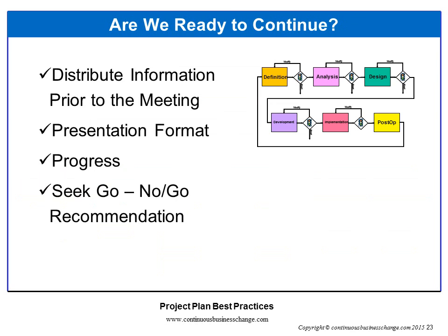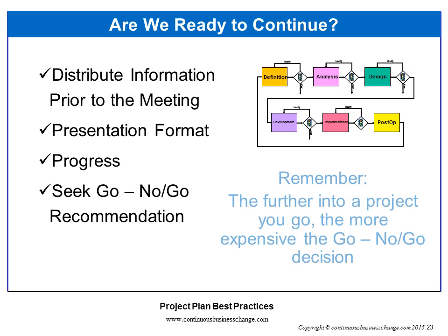There is a go, no-go decision at the end of each phase. The purpose is to ensure agreement on the work accomplished and the work coming up next. It's also an opportunity to acknowledge and validate any business changes that may have occurred. To simplify your project plans and improve project results, train your employees in following a defined project process that incorporates the principle of do a little work, gain agreement.